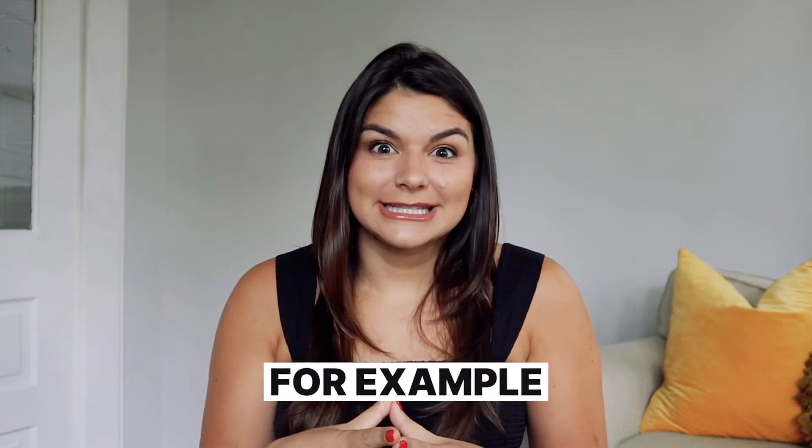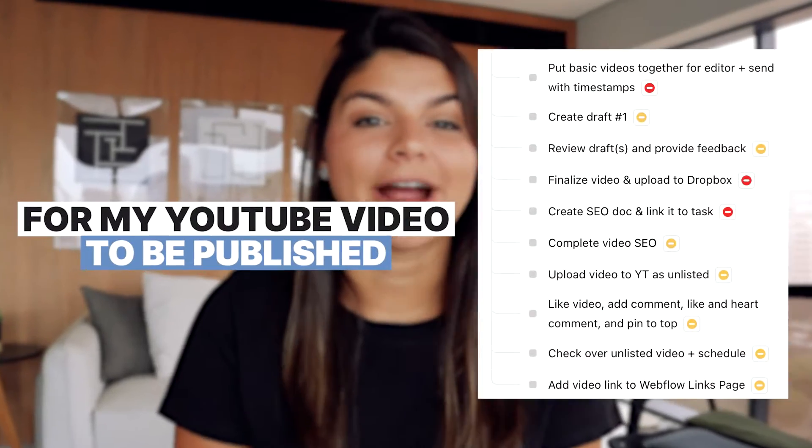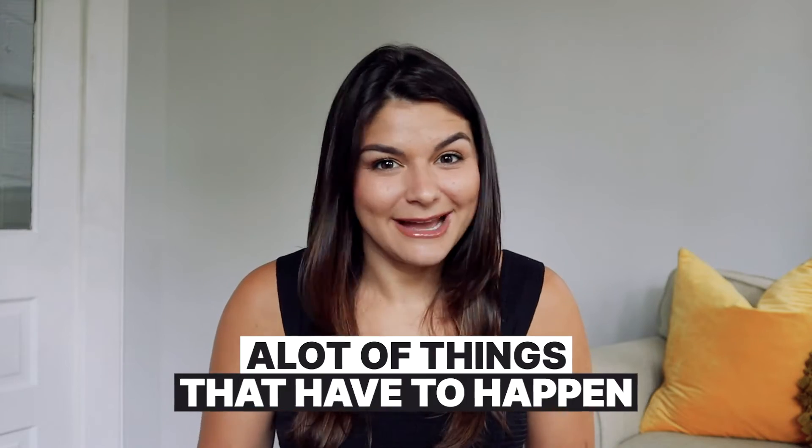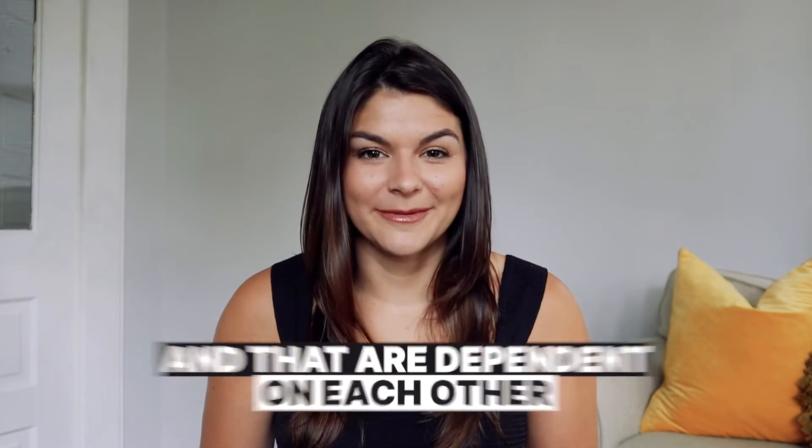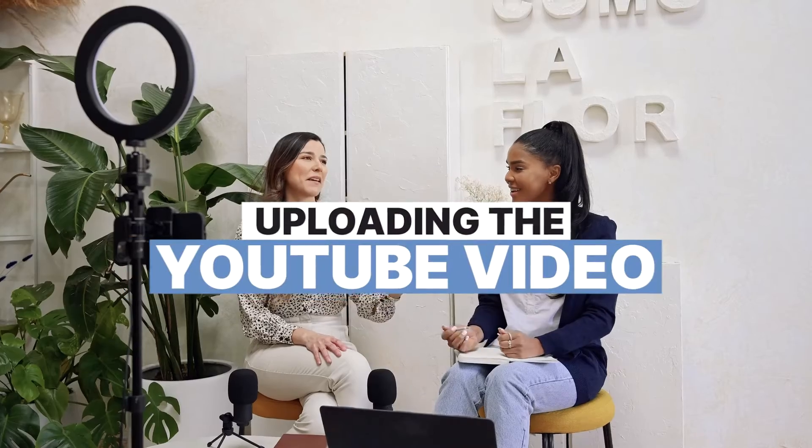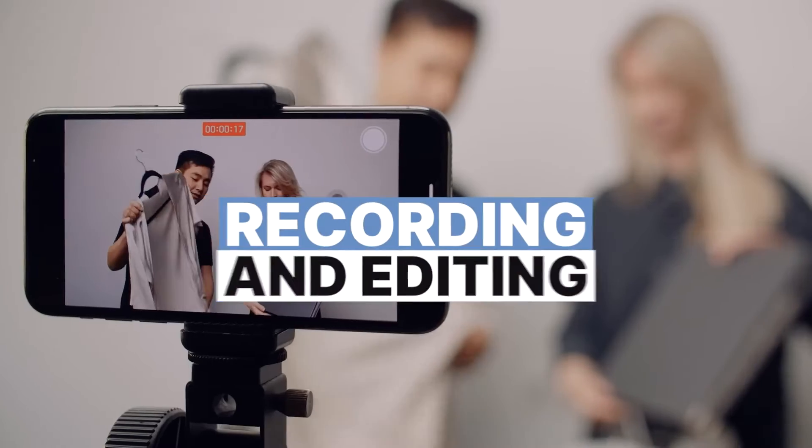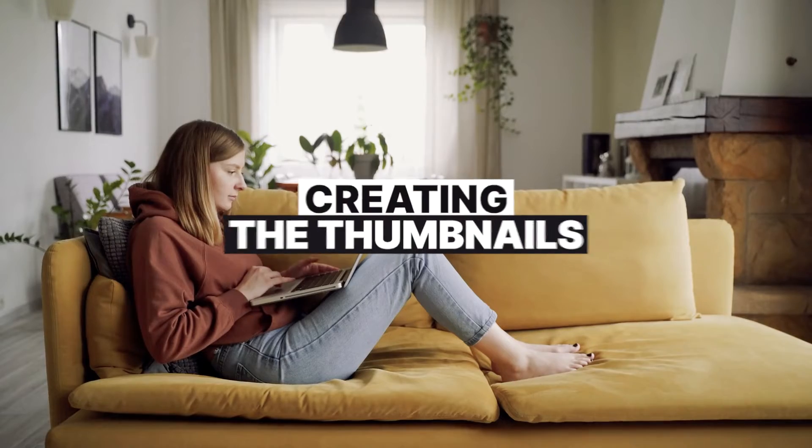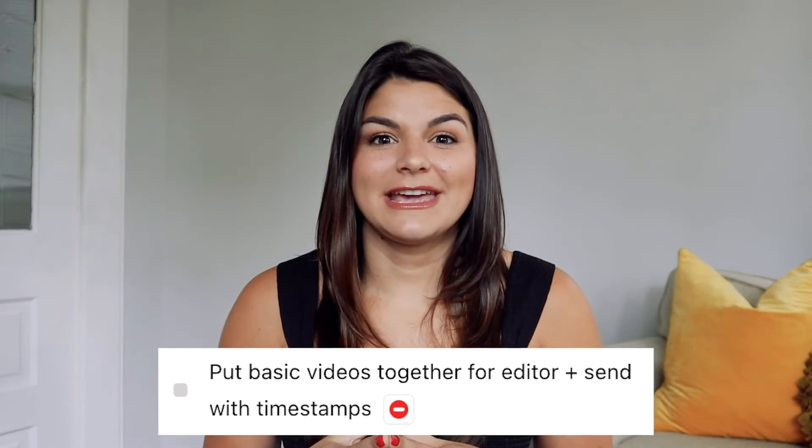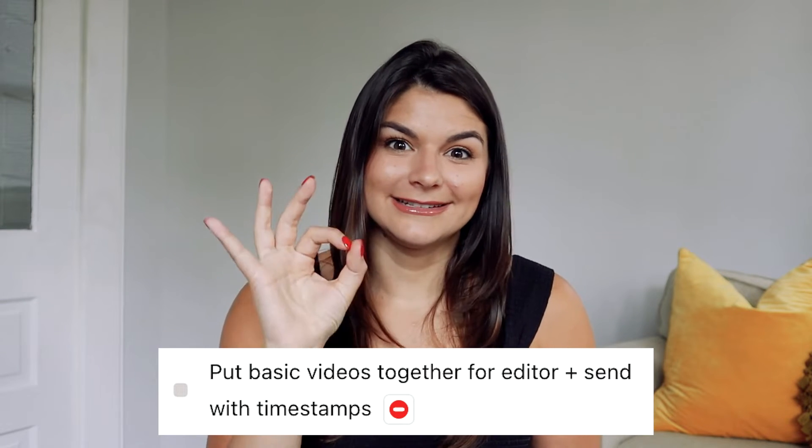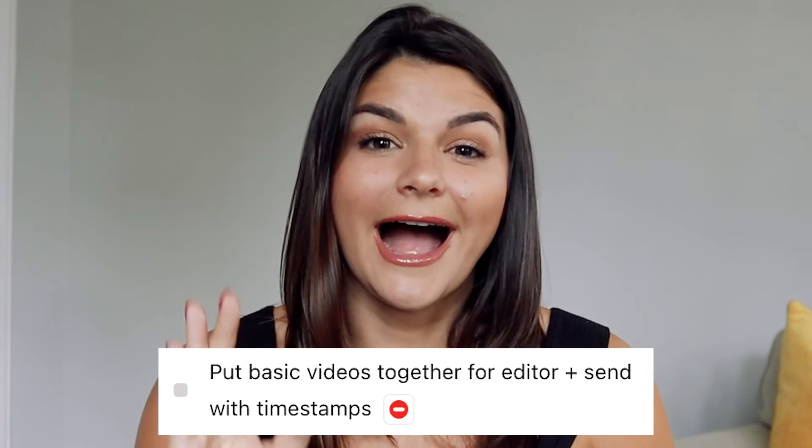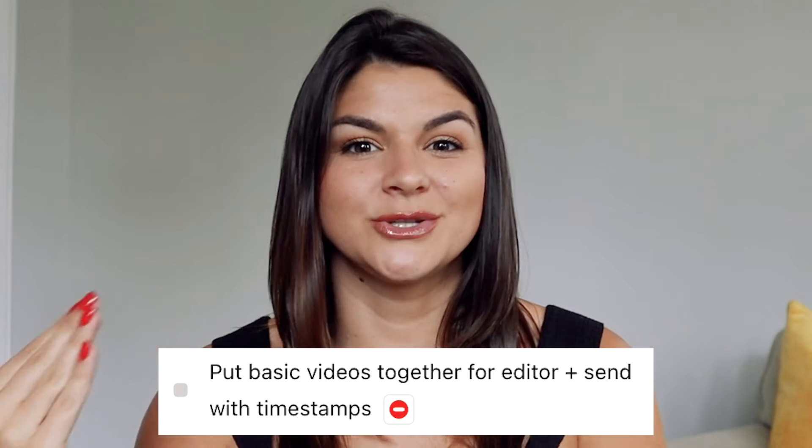So for example, for my YouTube video to be published, there are a lot of different things that have to happen and that are dependent on each other. The last thing, uploading the actual YouTube video, is dependent on filming it, doing the SEO, creating the thumbnail, all of that stuff. So when these tasks are on the calendar for a team member, we have dependencies on each of them so that they can see, okay I actually have a red dot on mine which means that I am blocking the next person from doing their job.